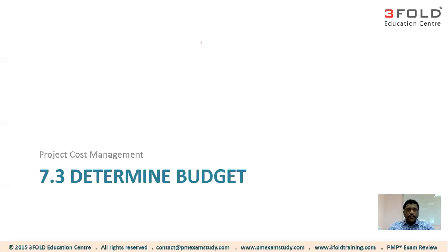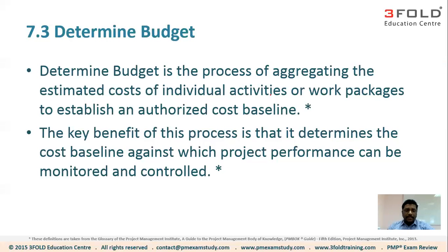Now, once the cost estimation is completed, once we know how much the resources are going to cost to complete the activities and in turn complete the project, we are now ready to prepare the project budget. But one thing you need to know: to prepare the project budget, we need to have the project schedule also ready with us. Now let me just quickly go through this definition of what is determine budget.